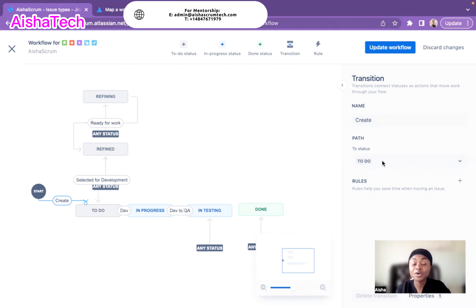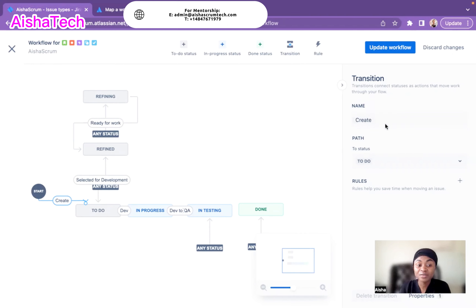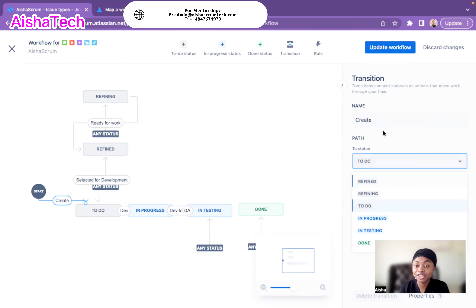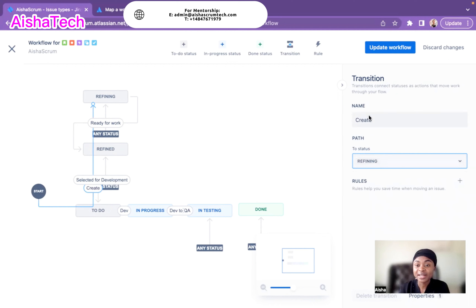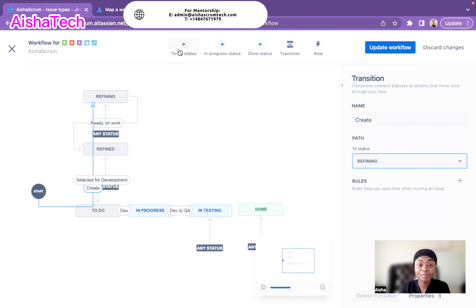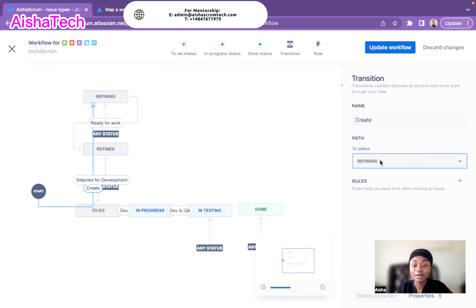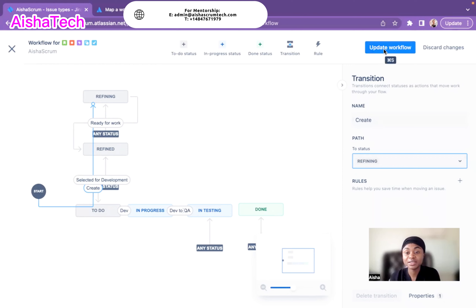To make these changes I go under the transition again, because transitions drive the workflow steps. I can change the name of the existing 'create' transition and update its path to go to Refining instead of to-do, meaning any ticket created will go to Refining first. I update the transition name to 'Refine' and hit Update Workflow.